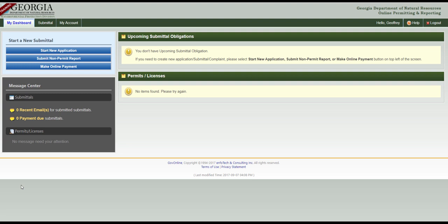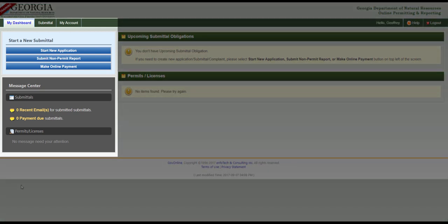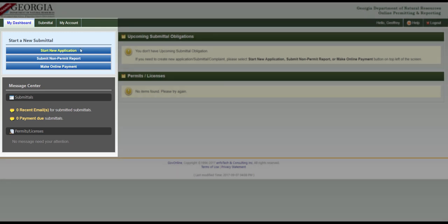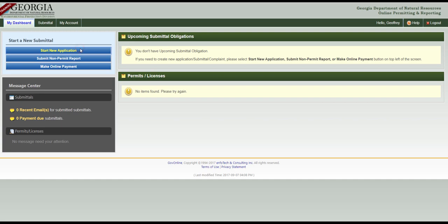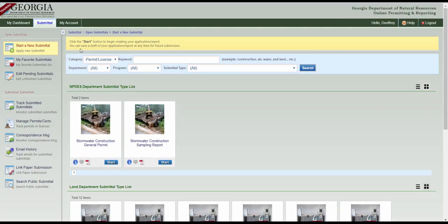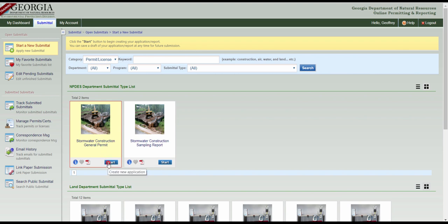This video will show how to submit a Notice of Intent using GEOS. Once you've created your account and are logged into GEOS, look to the left side of the page under My Dashboard and click the blue Start New Application button. To create a new NOI, click Start on the Stormwater Construction General Permit.